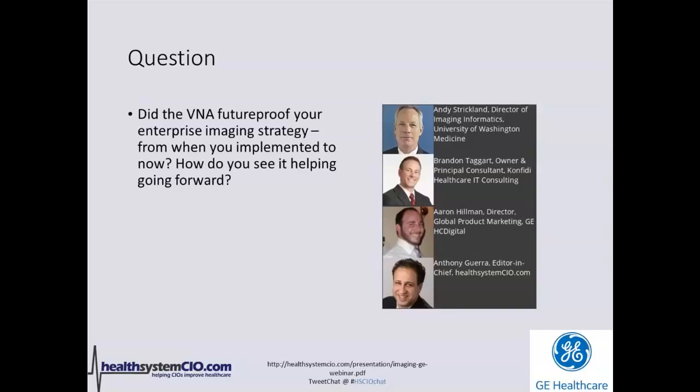So you have a lot of organizations that go forward with a VNA endeavor, and they want it stood up and ready to go in 6 months. That can be a complicated thing depending on the size of the organization, the volumes, thinking about data migration, because until you have data migration, you're really kind of stuck, and that might be a kill point for you. So just to that question, again, I don't mean to give indecisive answers, but depending on the situation, it could be yes or no.